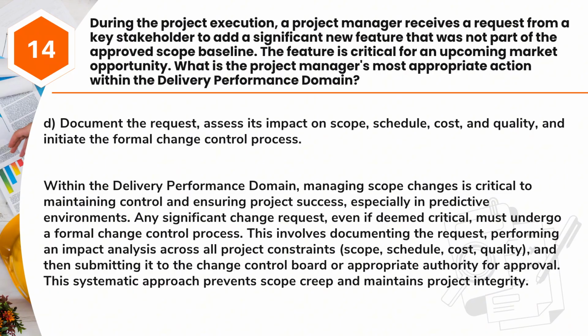This involves documenting the request, performing an impact analysis across all project constraints: scope, schedule, cost, quality, and then submitting it to the change control board or appropriate authority for approval. This systematic approach prevents scope creep and maintains project integrity.